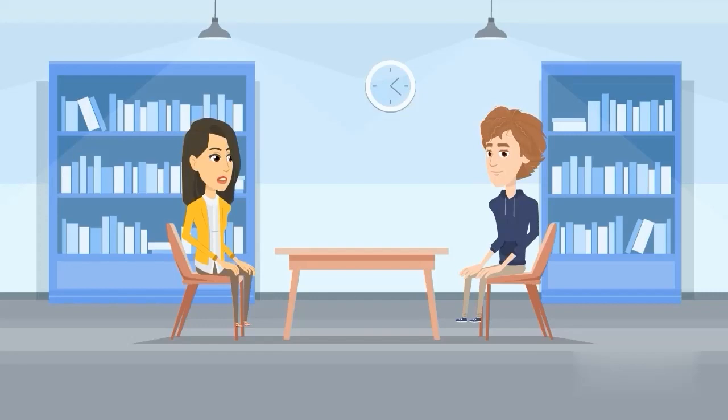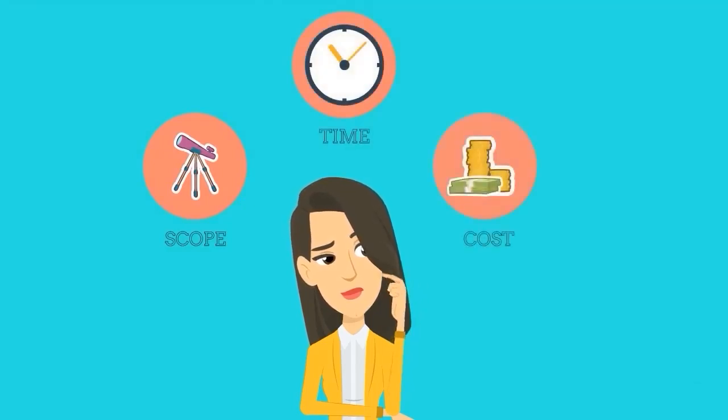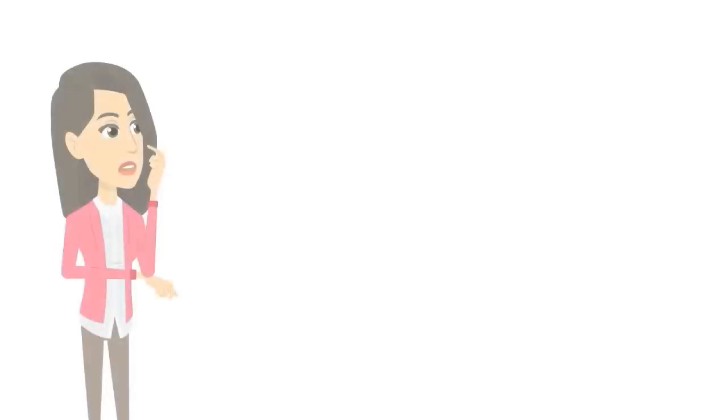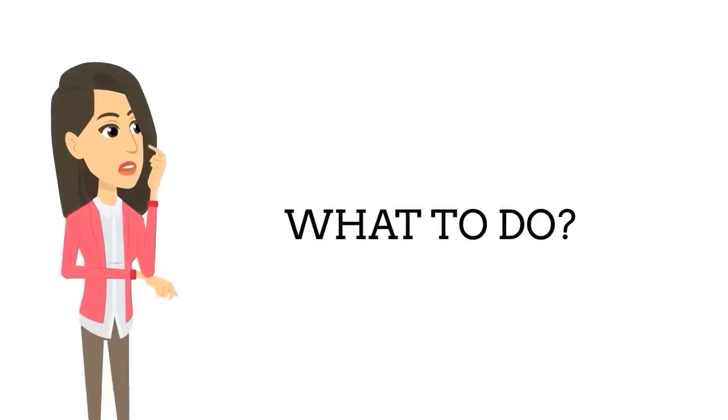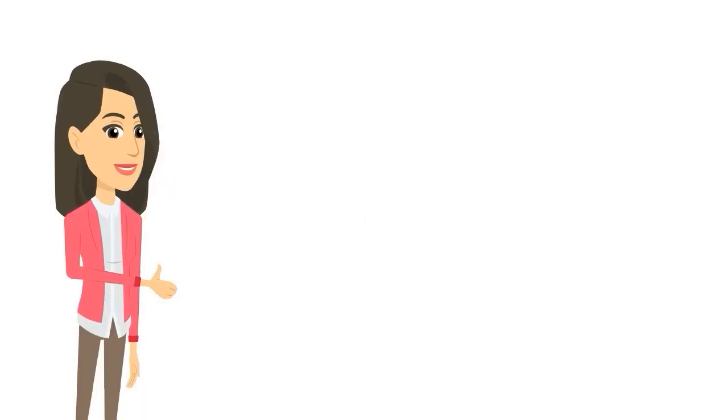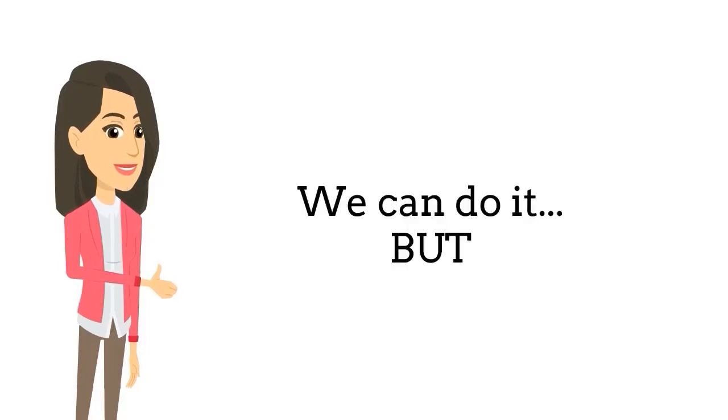Although you might like to say yes to the request, the iron triangle reminds project managers that you can't increase the project scope without factoring in the relationship with time and cost. Naturally, the client would prefer to change the scope without the time or cost of the project changing. So what do you do? As a savvy project manager, you understand the dynamics and navigate the conversation and say that you can do it, but